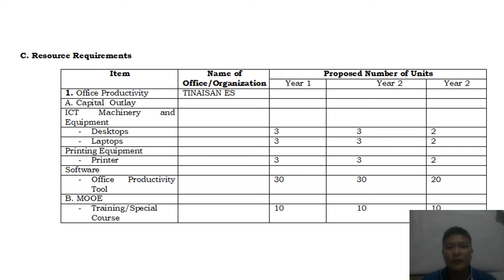For resource requirements under capital outlay and ICT machinery and equipment, the plan is to purchase desktops or laptops: three units in year one, three in year two, and two more in year three. For printing equipment and printers, the plan is to have one printer per classroom over three years: baseline of three printers currently, six by year two, and eight by year three.